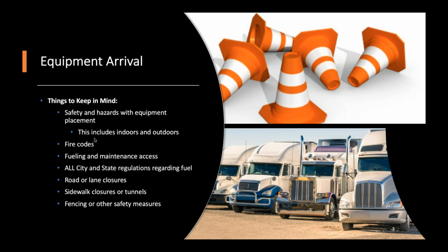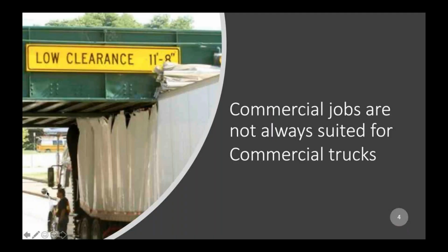You have to rent parking spaces for a week or a month while you're going to be there, and they'll actually bag the meters off to where nobody else can use them, and put no parking signs up. So it just depends on where you're at, what your city and local codes are. You also may need fencing in a lot of situations to keep general traffic out of the area that you're working on.